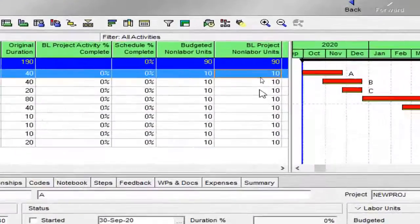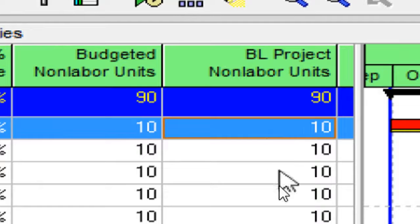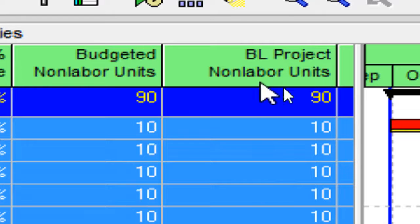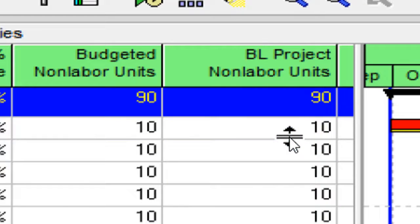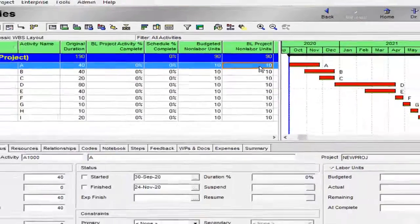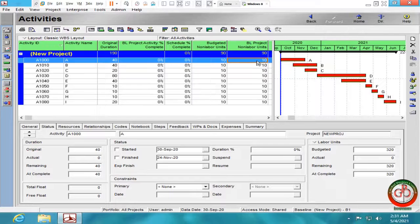Then see what happened to the project. The budgeted project non-labor unit is updated instantly. It is useful when you want to update your baseline budgeted.